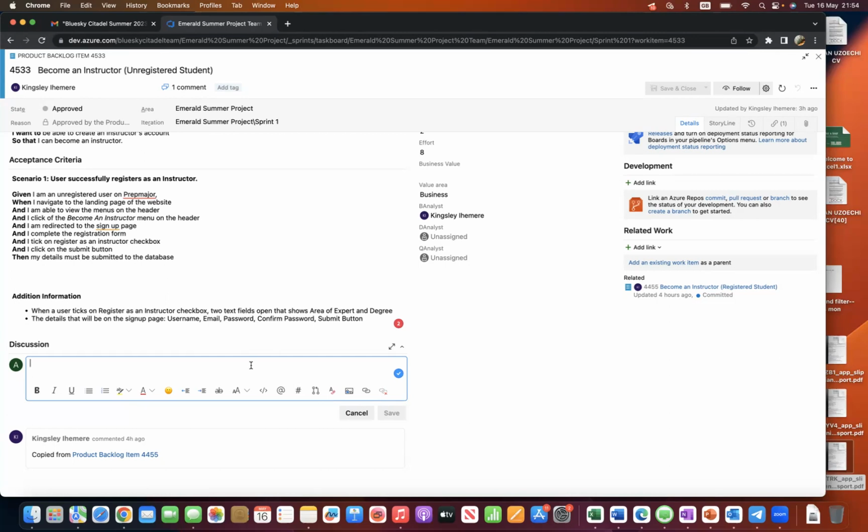We can't take in more than we've committed to. Who's going to work on that thing? That person doesn't have the capacity to do that. So we might reduce what is in the sprint, that is, if that story takes priority over every other thing we're working on. As a Scrum Master, you check with the PO to say, oh, sorry, PO, does this story take priority over everything? Oh, no, the other things in there take priority, I just want us to take it in. We're negotiating. Is it possible for us to add it to the next sprint?